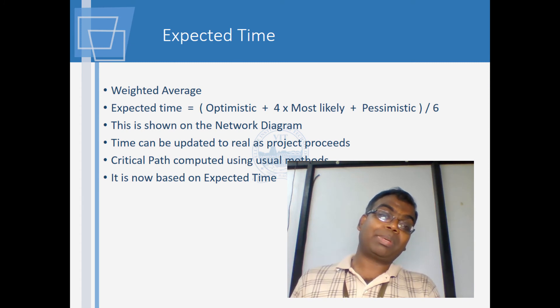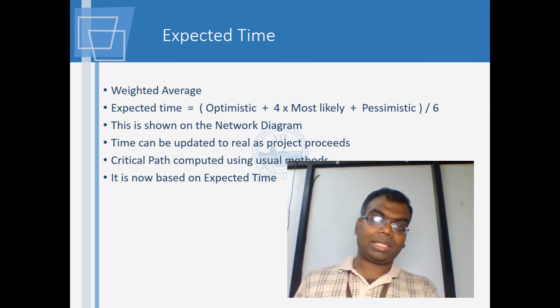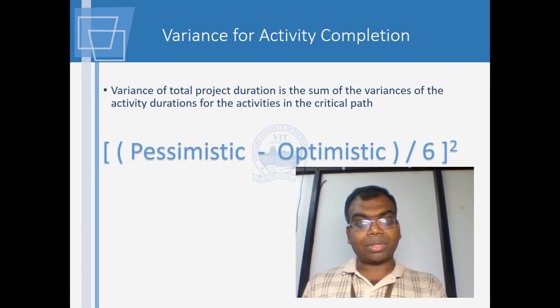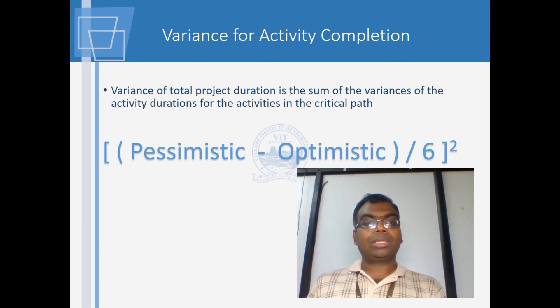The critical path is estimated as per the usual methods — we go by the forward path and backward path, or we build a table, put in values, calculate the times, and fill in the results. This is what the computer actually does. It is based on expected time rather than the deterministic time used in CPM. Here is the variance for activity completion.